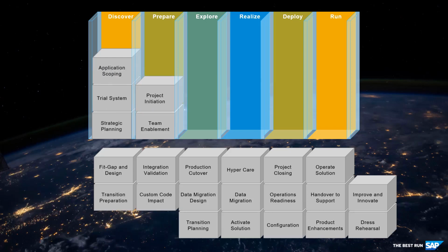An important part of the prepare phase of the project is the formal project setup. This needs to be aligned between SAP and the customer. The project manager from the customer or implementation partner runs the project. If the customer makes use of an SAP Value Assurance package, an SAP Technical Quality Manager is established as your contact partner to discuss all topics related to the transition project and to manage the quality gates. He takes care of the setup of the governance structure for the project and takes the leadership for scope definition and execution of all tasks done by SAP.